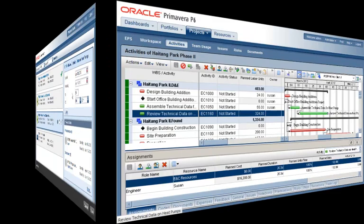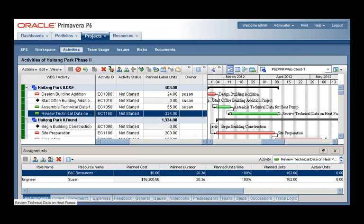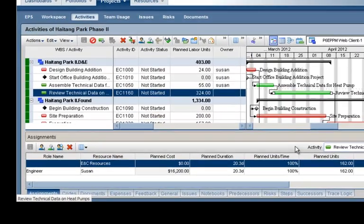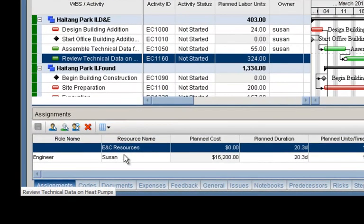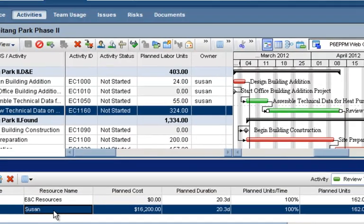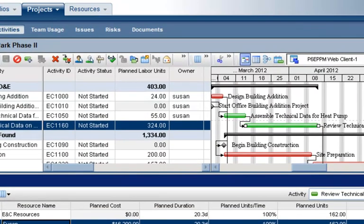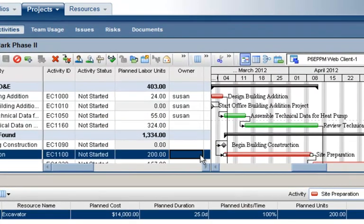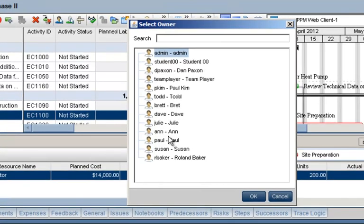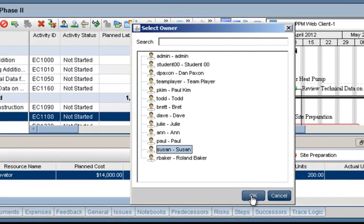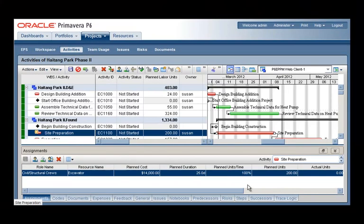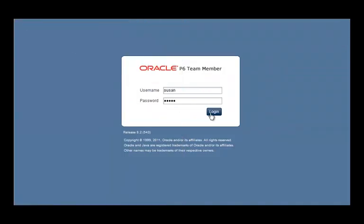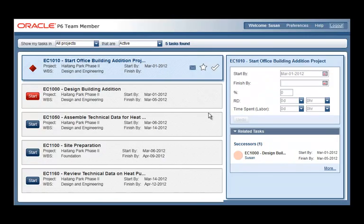Project managers can assign team members to activities in two ways: 1. They can assign a person as a resource on the activity, or 2. They can use the owner field to assign the team member as an activity owner. Once the project manager has assigned the team member by either of these methods, the team member can log into the application and provide status for those activities.